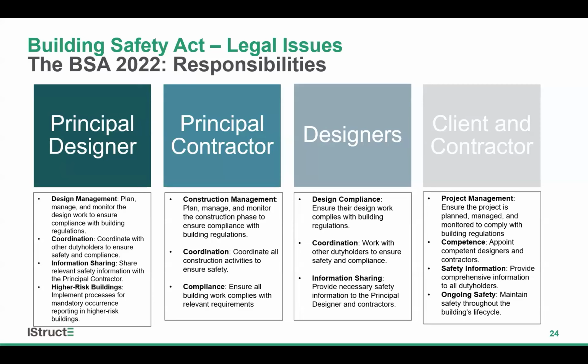So the key challenges for structural engineers within these various roles, as I see it, will be managing the coordination and information sharing obligations. We're already seeing situations where parties are refusing to take on responsibility for certain things, and presumably coordination obligations increase the risk of claims against multiple parties, as it blurs the lines between each party's obligations and the role to a certain degree. So structural engineers should take care to ensure the terms of their appointment are absolutely clear, including, crucially, the scope of works and clearly defined roles, if any of the duty holder roles apply.